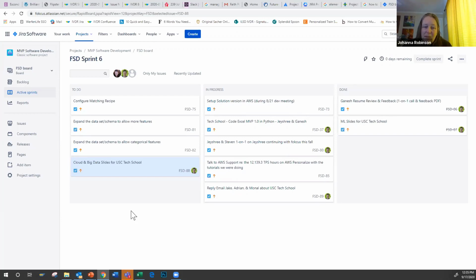But then during the course of the project, if we get really stuck, especially with a technical thing, like we just can't figure it out, that's a good time to be thinking about whether we should reduce or change the scope. Is this feature something that our team has the capability to build? Is there a different way to get where we want to go? Curling talks a lot about business goes faster than technology. So is there a manual solution that accomplishes the same thing? Those are the types of pivots, and I usually see them at stuck points.